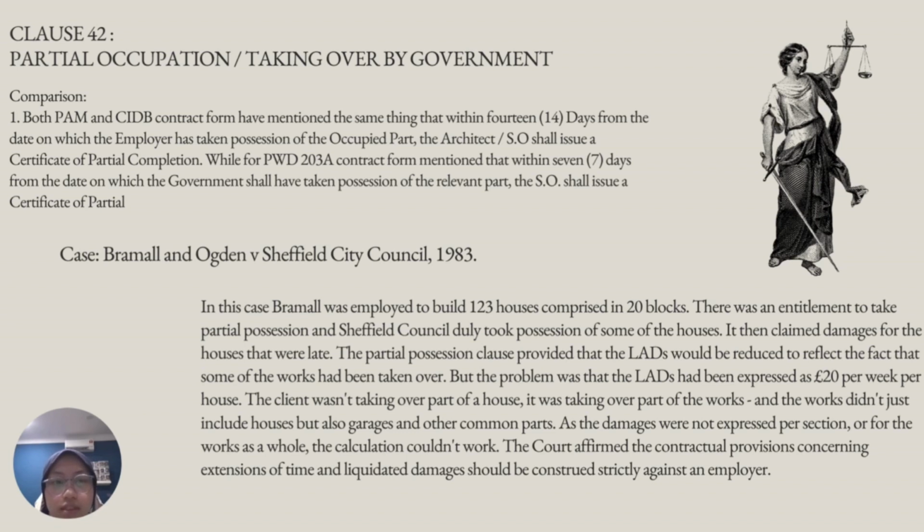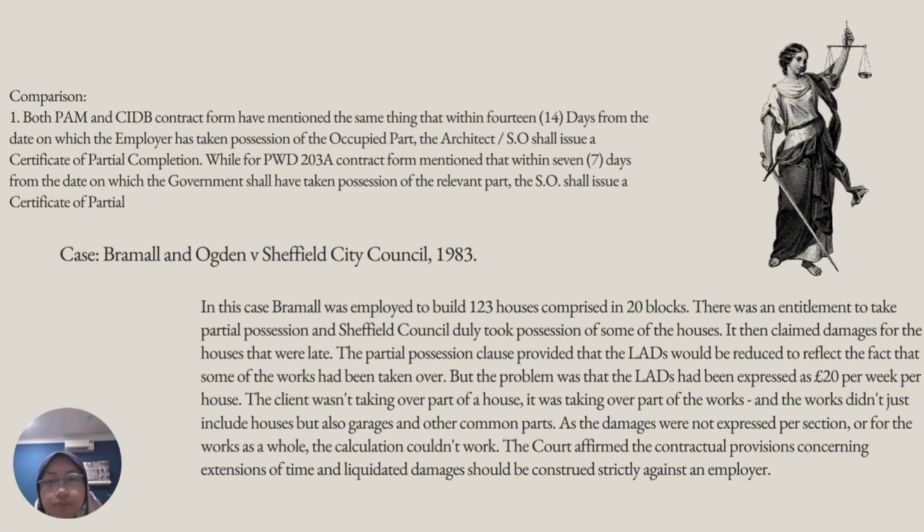And the works didn't just include houses but also garages and other common parts. As the damages were not expressed per section or for the works as a whole, the calculation couldn't work. The court affirmed that contractual provisions concerning extension of time and liquidated damages should be construed strictly against an employer.